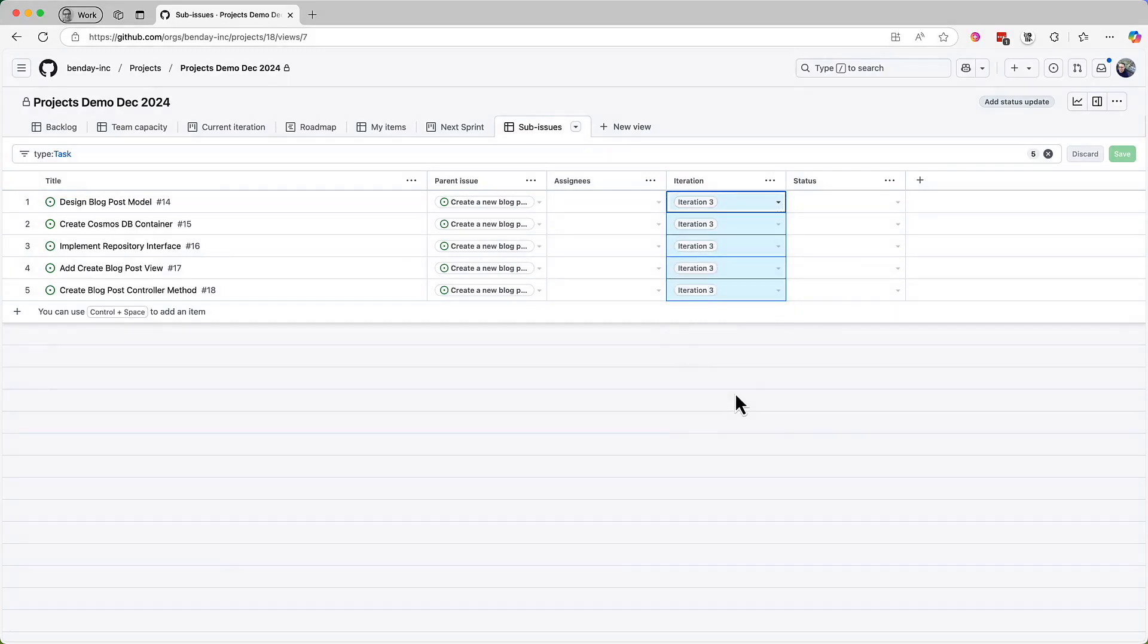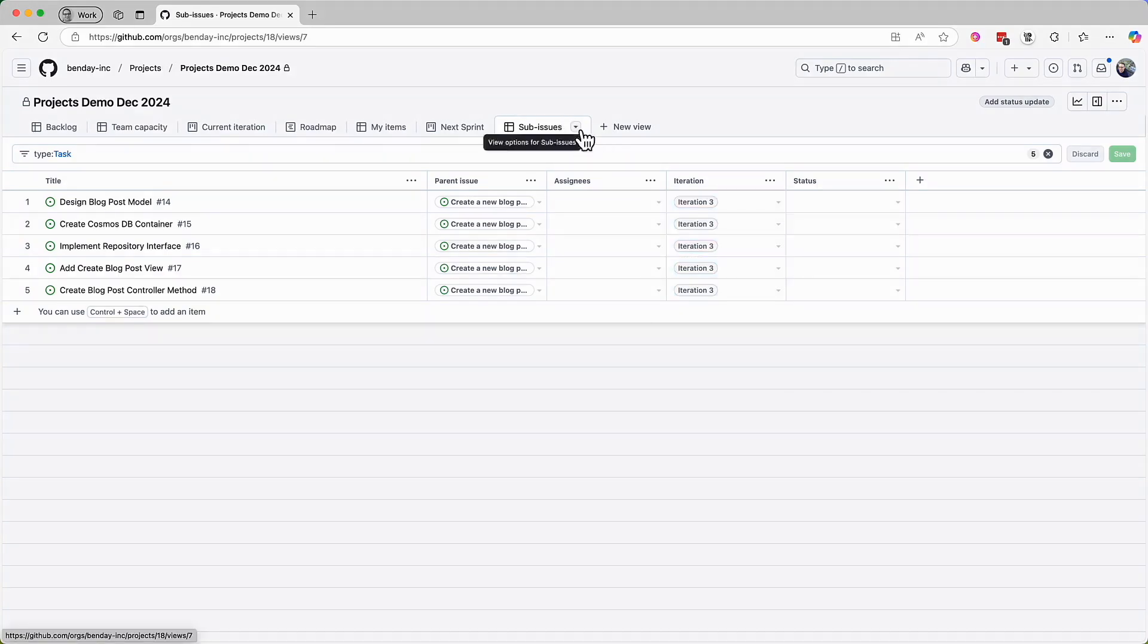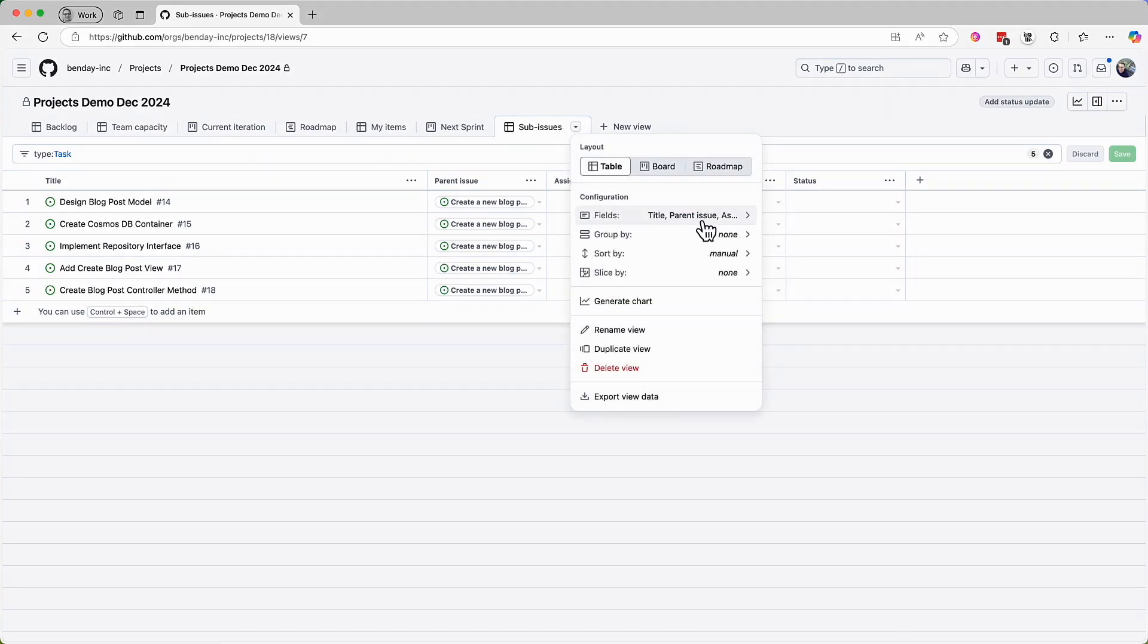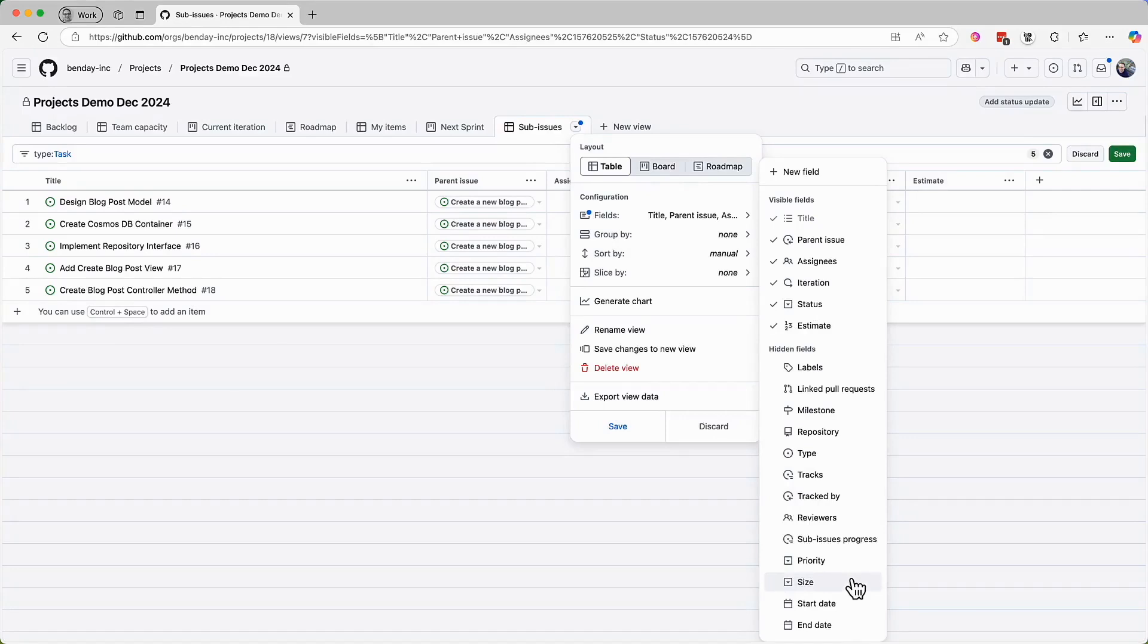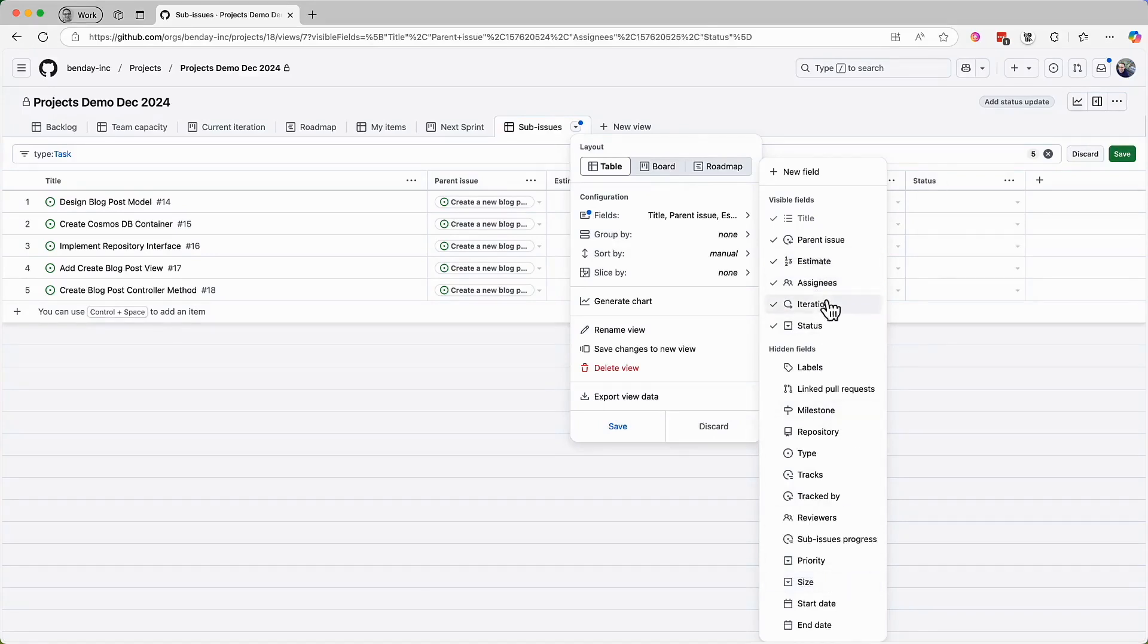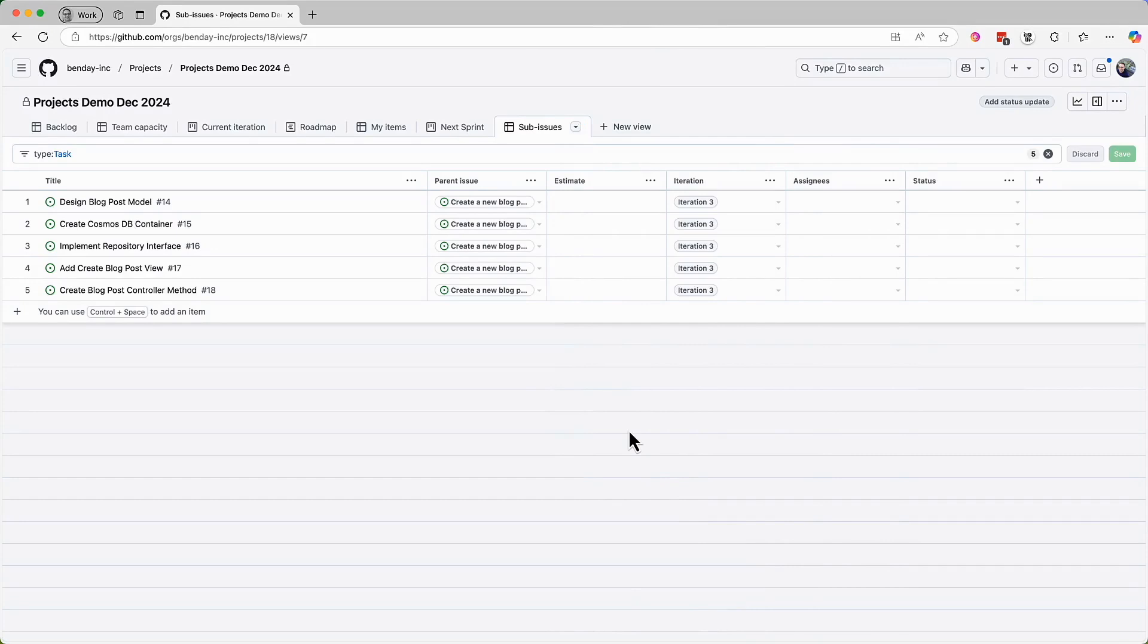Now we've completed the basic plan for the create new blog post PBI and the five tasks that the team thinks they'll need to do to complete it. But one of the big things that's missing is the time estimate for these issues. That's another column that would be nice to have. So let's add that estimate field to select that column and then rearrange the field columns so they're in a good order and then save those changes.